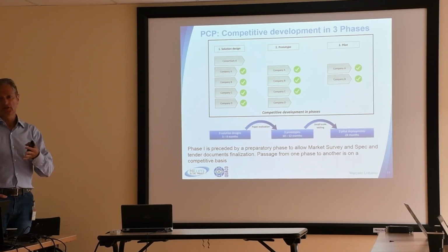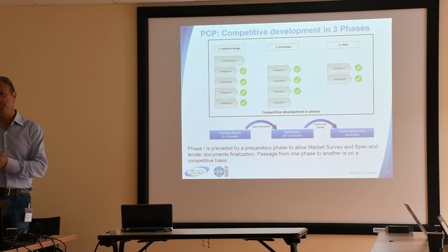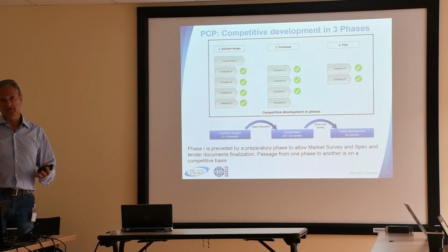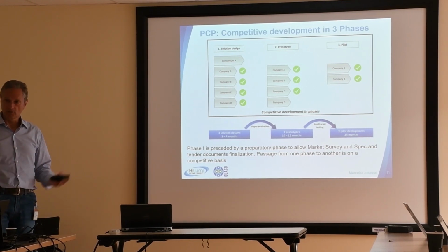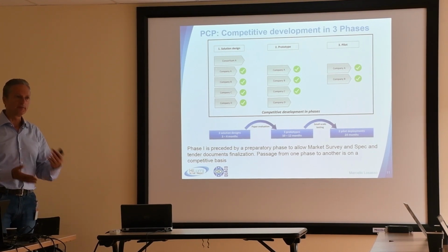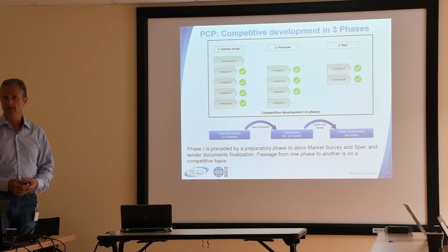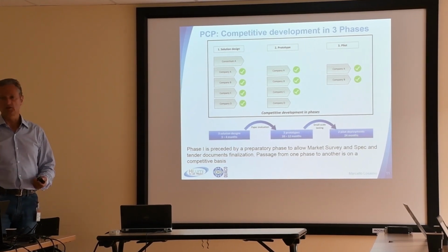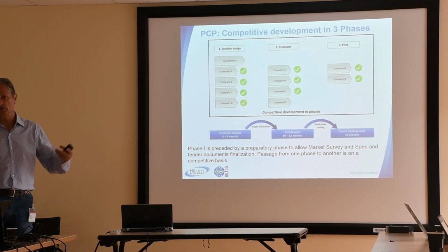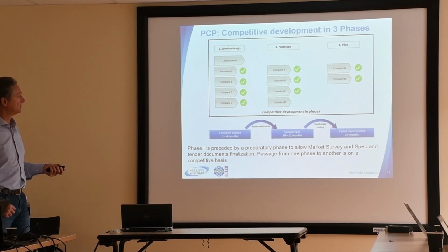And then you have to do this respecting certain timing that is requested by the Commission. The reason is obvious. You want to have the maximum diffusion of your incoming procurement. You want to attract as many companies as possible to this job. So you have to do something that is regulated by a procurement scheme.